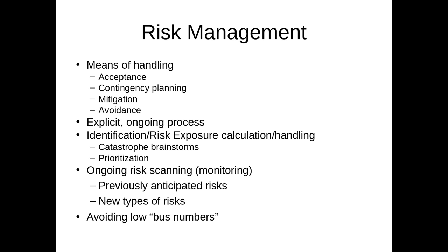What is the risk exposure? It's often quantified as probability times damage if it happens. And so mitigation strategies can either make it less likely this will happen, or if it does happen, make it less serious. But the point is you invest ahead of time. You actually put something in place to reduce this.